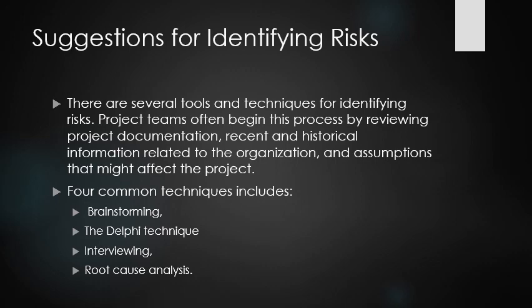Project teams often begin this process by reviewing project documentation, recent and historical information related to the organization, and assumptions that might affect the project. The four most common techniques include brainstorming, the Delphi technique, interviewing, and root cause analysis.